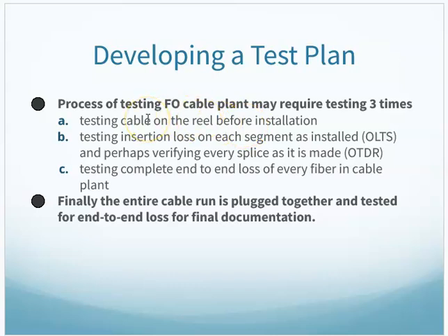Testing the reel when it gets delivered, a giant reel of fiber optic gets delivered to the site, a couple kilometers long. You might need to test it then and there to make sure there's no damage. Once you put it in,